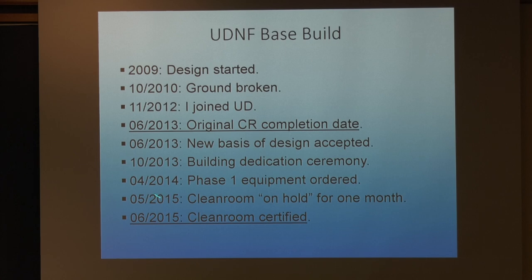Around April 2014, we ordered most of the phase one equipment. Something very interesting happened in May of 2015, just one week before the cleanroom was to be certified. The leadership of the university changed. And the question arose, is it worth it for us to spend this kind of money on the cleanroom, when the cleanroom was just one week from being certified?